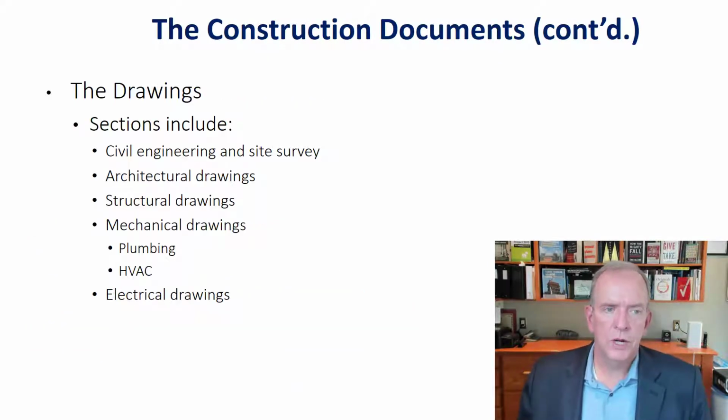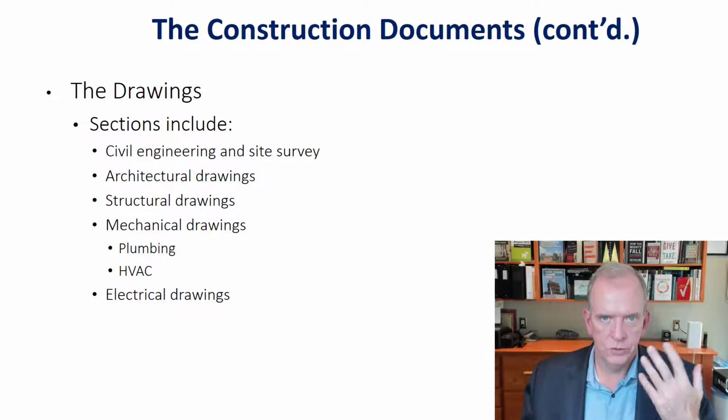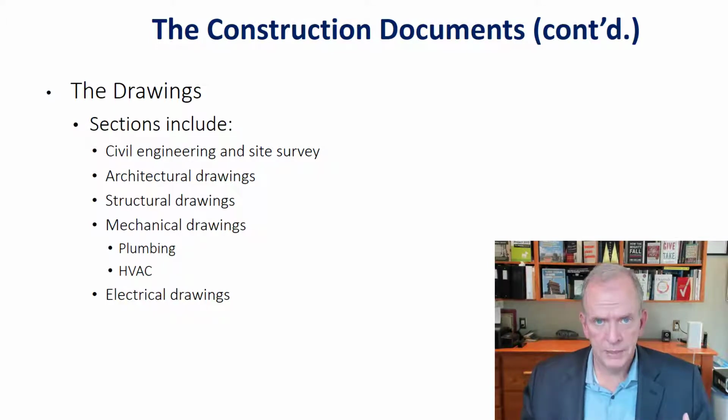So when we talk about construction documents, we have to think about the drawings. And you know, there are a lot of drawings that we utilize on a construction project. You may be familiar with the architectural drawings, and very often if you're in low-rise residential, there's just the architectural drawings, and you'll have like electrical outlets indicated and things like that. HVAC sub will do their own drawings. They'll submit for a building permit to the permit office. Electrical subcontractor may have to apply certain elements of that for their hydroelectric permit through the electrical hydro office.